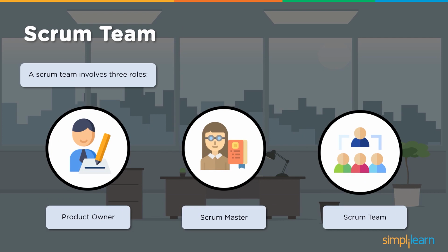Then the Scrum team involves the product owner, Scrum Master, and then the Scrum Team. Each of these is a different role having its own objectives to accomplish with specific directions, and these cannot be merged. For example, the roles and responsibilities of the product owner cannot be given to a single individual who is a Scrum Master. Both roles cannot be given to a single individual because it conflicts with the objectives of both roles. So thinking about making one of the team members the Scrum Master or product owner is also something which will not work, which will not give the required results.